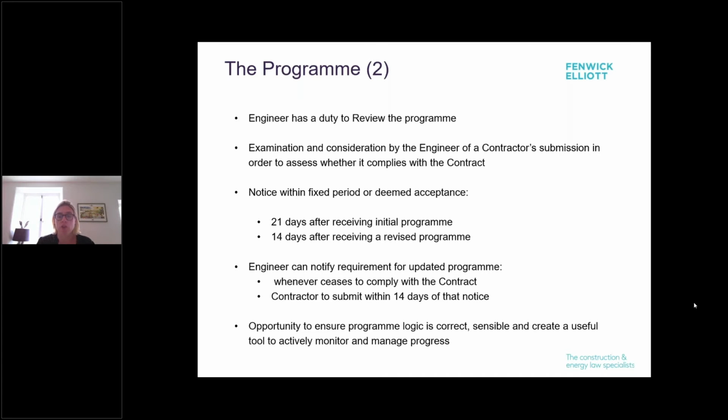And again, that's helpful because you don't get into silly arguments about what is and what is not your baseline programme, both for the initial programme but also for revised programmes when you have extension of time claims potentially down the line. The engineer can also notify requirements for updated programmes when he considers that it ceases to comply with the contract, and then the contractor has to submit a new one within 14 days of that notice. So this is a really useful provision, a useful tool for managing the project properly, but you've got to ensure the programme logic is correct, sensible, and creates a useful tool to actively monitor and manage that process.